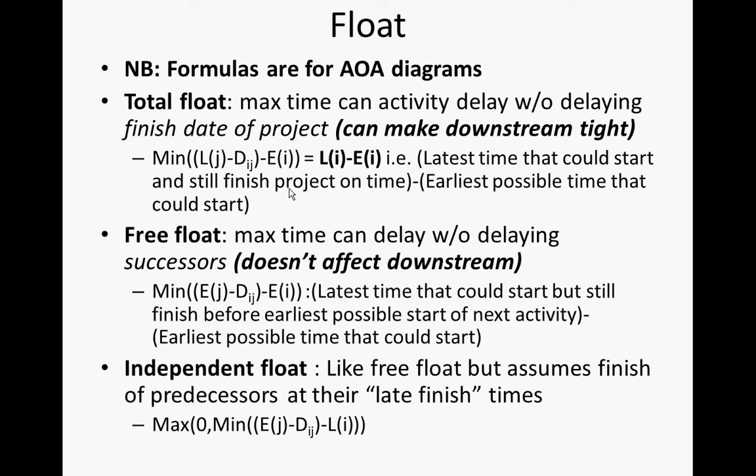For example, you might be able to burn your free float here. This guy has free float equal to 4. It has total float equal to 4. This guy here has total float equal to 4, but 0 free float. If this guy delays by, say, 4 days, or by 1 day, it's eaten the slack of this one. It's eaten the float of this one. Now this one has less flexibility about when they schedule things. I've imposed a hardship. I've imposed tighter constraints on the later person.